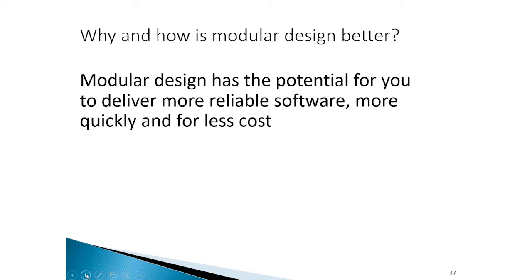If we're dealing with a modular system, that means that we can test and ensure the functionality and reliability of individual modules as we go. And that effectively means that we're able to take the big problem of doing all of our testing at the end of a traditional waterfall and monolithic system, and we can test earlier rather than later so that we can find out sooner about any potential problems or any potential risks.